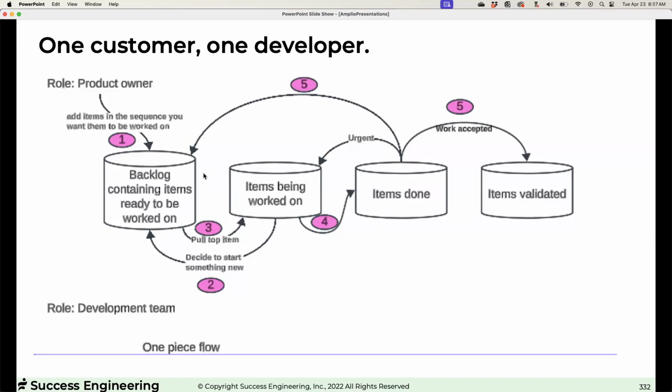Now, by the way, this didn't solve all the problems. Why? Because they still can't read my mind. When I had them start converting icons, which are really big icon files I bought from Shutterstock, I think it was, I couldn't read them because they don't have an EPS reader. So I asked them, hey, cut these up into little things so I can see them. So now we had what's called a class of service. If it's a graphic, that's one thing. If it's an icon and I want an SVG, that's another thing. But it all goes through the same way. We just had a different file to put things in.